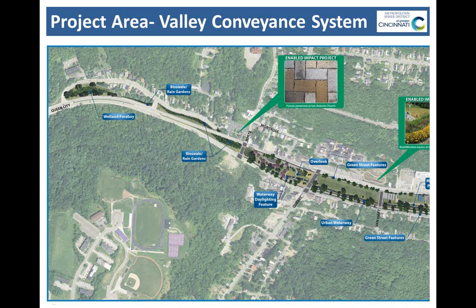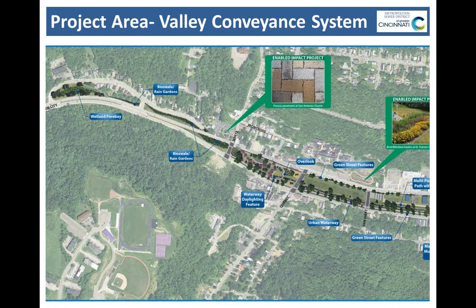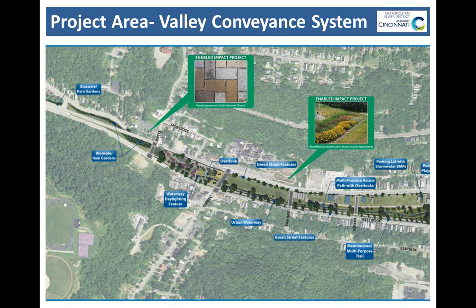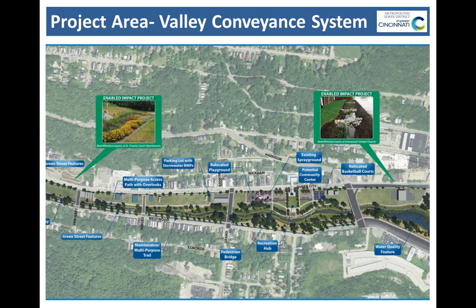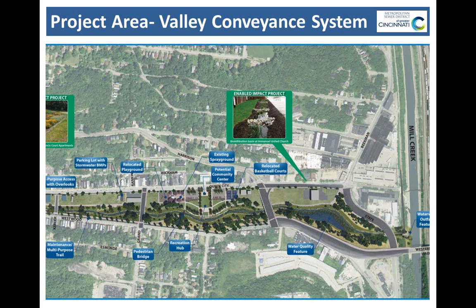And so the stormwater that's separated from those multiple projects on the hillsides of this watershed will be what primarily feeds this urban waterway, which daylights there in the center of the screen as I'm showing it now. So similar to the last slide, I'll advance this one to let you see how this waterway is envisioned at the moment. And you can see how, based on the previous slide and the number of buildings that existed, the amount of demolition we're talking about. We're looking at removing approximately 75 buildings throughout this corridor, leaving a couple dozen behind, but the majority will have to be demolished over the next few years because construction of this project will begin in the spring of 2016.